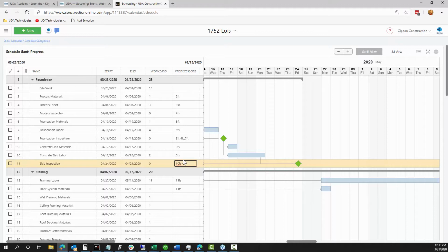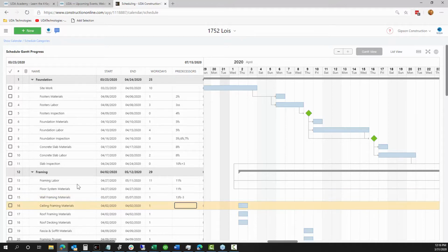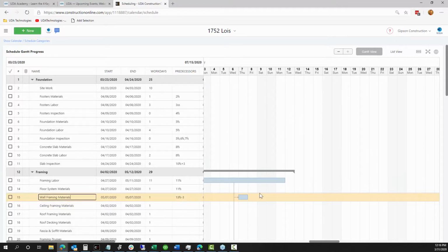And that's pretty common for things like material ordering, where you might want to say, okay, we want this task to start when this one only has 2 days remaining in it. So especially if you've got a longer task or something that you're trying to set up that way. Here's what that would look like. So if we want to say that this one is going to go with maybe 13, what we'll say minus 3 days. You'll notice that it's basically going to build in, it's indented 3 days in up under this task, and that relationship will again stay as we continue to make those adjustments.